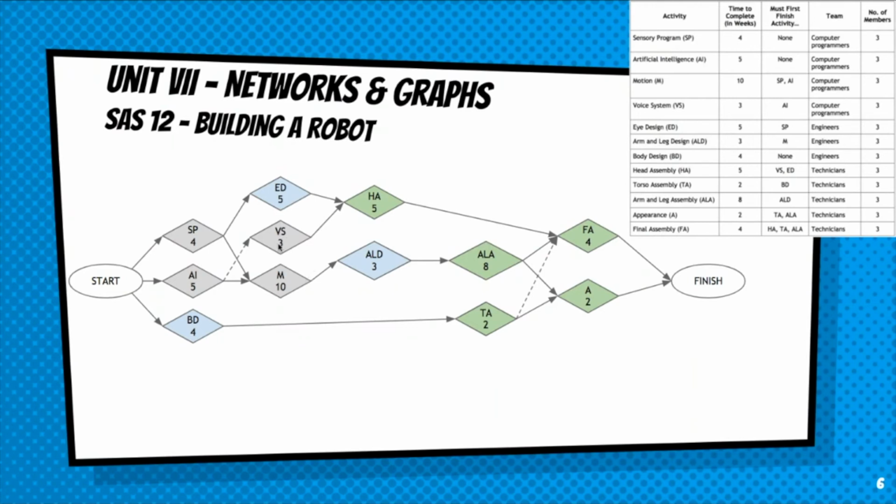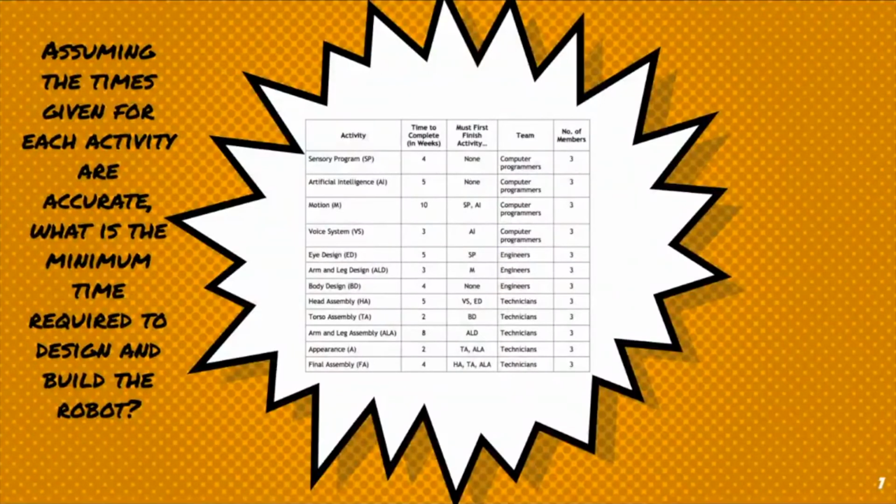But a good project manager would realize the duplication of putting extra people in there to help get the process done. That reduced the program by 2 weeks. You don't have to pay them as long if they're not there as long. So it's all about being efficient. That efficient person that runs that program, the project manager, he's the one who's going to make extra money if he gets a project done early and he doesn't have to pay people as much.